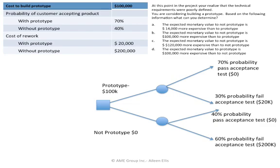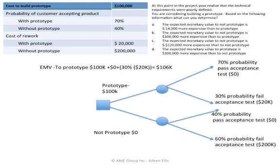Now let's get back to the question. I need to understand the expected monetary value to prototype and the expected monetary value to not prototype. The EMV to prototype would be $100,000 to build the prototype, plus $0 rework if the real product passes acceptance testing, plus 30% times $20,000 if the real product fails acceptance testing.